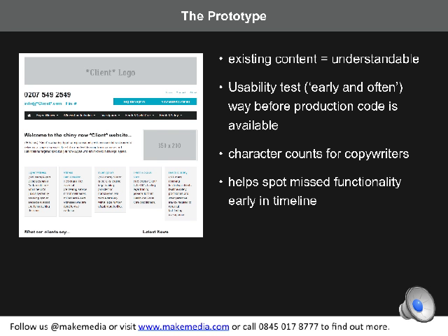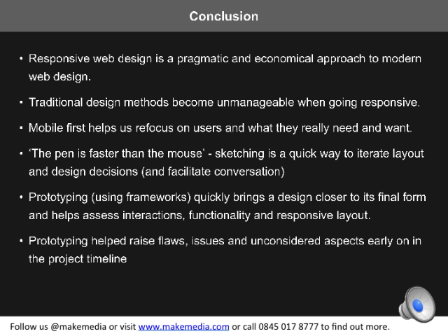right at the end of the process, when you're starting to release a test site for them to review, which is the next time when you're going to actually see a working version of the website, if you're using the old methods. And that's not a good time for you to be having conversations about the things that you've got to budget in and who said what and when during the contract stage. So it really helped us get everything out onto the screen that we knew we needed in the brief, and it helped us realise what we hadn't considered correctly or how better we wish to do that. And then it gives you the rest of the project timeline to help polish it and move it on.